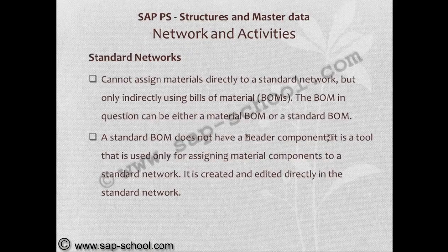Standard networks cannot assign materials directly to the standard network, but only indirectly using bills of material. The BOM in question can be either a material BOM or a standard BOM. A standard BOM does not have a header component. It is a tool that is used only for assigning material components to a standard network. It is created and edited directly in the standard network.